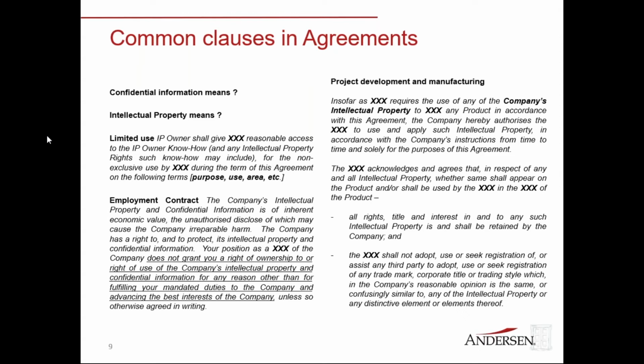And especially in cases involving different jurisdictions, virtual hearings should be considered and included as part of the dispute resolution process in all agreements. Remember that arbitrations are consensual. And so in the absence of an agreement, a party cannot be compelled to follow a process suggested by the other side.